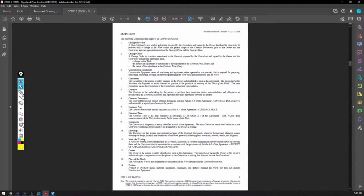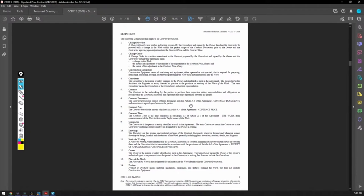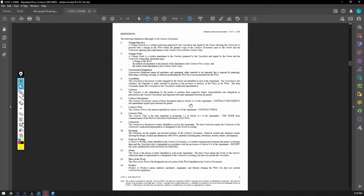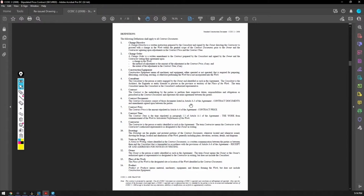So make sure if you're bidding a job, you have all the documents. And when you're submitting a price, you're always telling this price is based off of, and you list this drawing, dated this, whatever, architectural issue for tender or issue for construction, whatever, drawings, like, edition, whatever, and specifications, dated this. And then you also have, if there's like five addendums, and also addendums one to five.